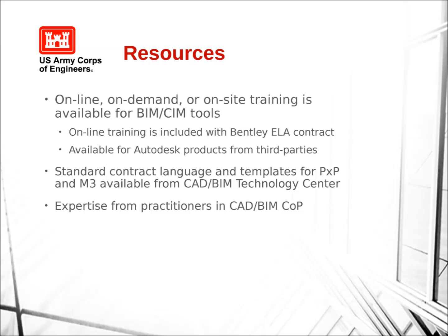No, I mean, Jason, you hit on the point that I was going to make as well. That demonstration meeting really is a key. And as you are developing your contract language, I suppose that's something for everyone to be aware of. The current BIM contract language has existed in what has been called Attachment F, based off of the RFP Wizard. That's in the process of being updated into a UFC compliant 3-part specification. We're targeting the release of that in May.